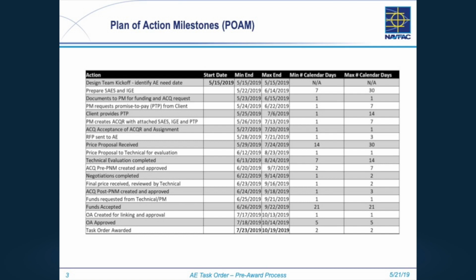So if I'm doing a design and my civil engineer needs the survey in order to start their work, and I'm not going to have the survey, I award it in October, maybe they get there to do the work in December, maybe I get the product in January. You know, the civil part of the job is the first part of the design, the site planning. So what's that do to my design deliverable? Am I really going to make March design completion on 100% design? I don't think so.